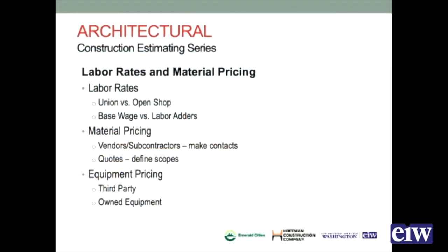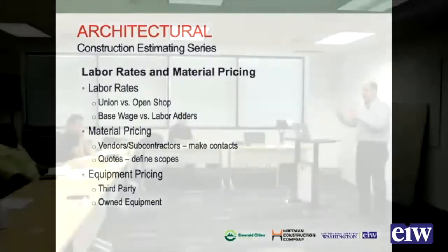And equipment pricing, so are you renting it from a third party, or do you own the equipment, or are you renting it to yourself? Is the job long enough duration where it actually makes sense to buy the equipment instead of renting it? And then prorating that over maybe the courses of several jobs, so that you have the equipment, and you've got to maintain it, but now I've got some equipment there and I don't have to go to a third party to rent it.